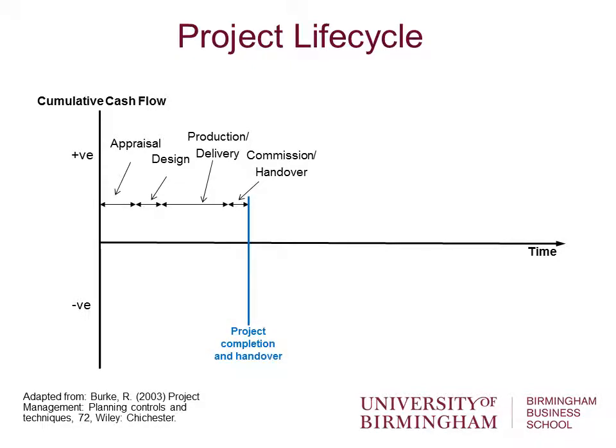At handover, that will be a project completion point, and the project will be handed over, the outcome of the project, be it a product or be it a building or whatever it is. So it's handed over and then goes into operation. So one of the points I'm trying to get across here is the distinction between project delivery and operational activity. Okay, so there's a series of project activities which get to the point of delivery. After that, the project goes into operational activity and becomes an operation.